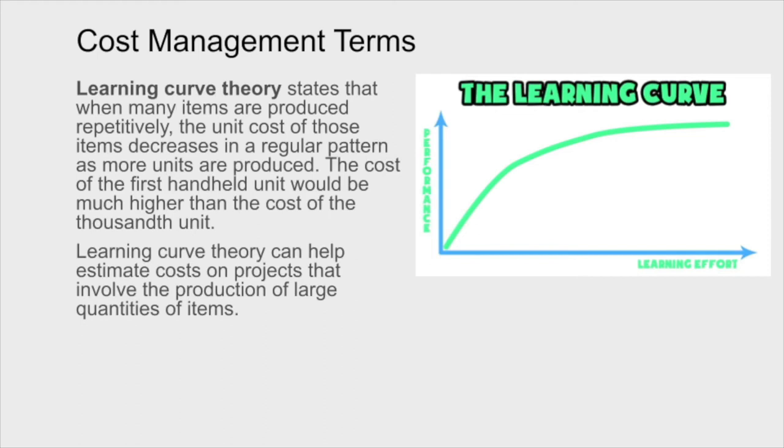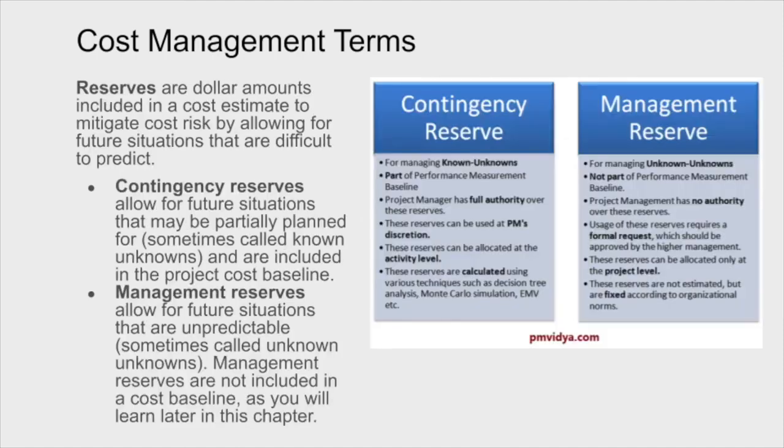As you became more practiced at it, what took you long to do no longer takes you as long. In other words, you've become better at it. So that means the actual cost of doing the task in terms of time has dropped. And that's effectively what the learning curve is all about. As we get better at something, the cost per unit will drop because we get better at making each individual unit. So if we've got a project that's a one-of, it will take us a certain length of time to do. If we do 6 or 7 projects that are very similar, I'm sure that we can bring down the costs of it.